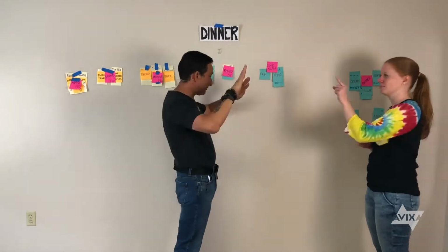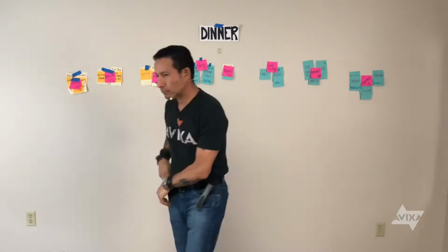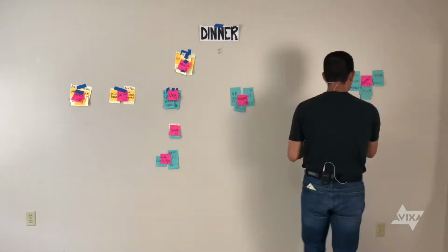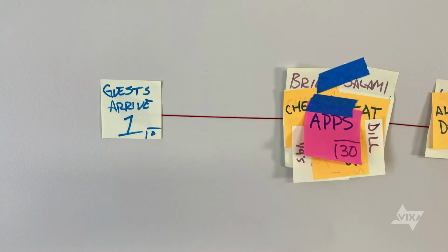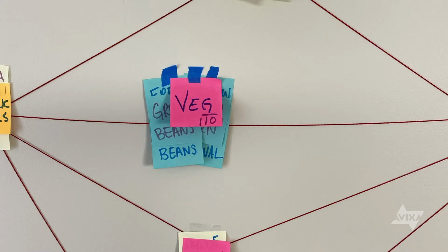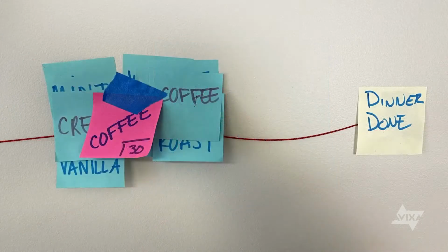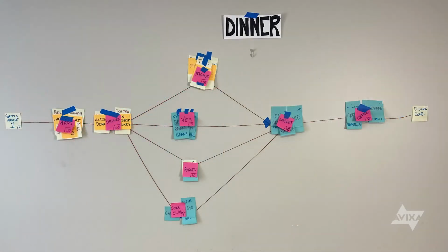Then, starting from my goal or milestone, I can work backward and figure the longest amount of time it's going to take this particular sequence. I call this my critical path. Once I establish my critical path, I can figure out how long it will take me to complete the selected sequence of tasks. I can also figure out how much time I will have in between other tasks.